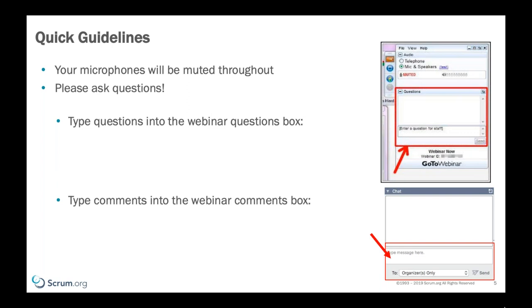So I think budgeting actually becomes much easier in the Scrum world. I've got 10 Scrum teams. This is what it costs to run those 10 Scrum teams for a year. I think 10 Scrum teams is enough to build all the things that the business is going to ask for. There's my budget. I know organizations try and make it more complicated than that, but that's one of the things that I try and unpick when I go into organizations, because it doesn't need to be any more complicated than that.